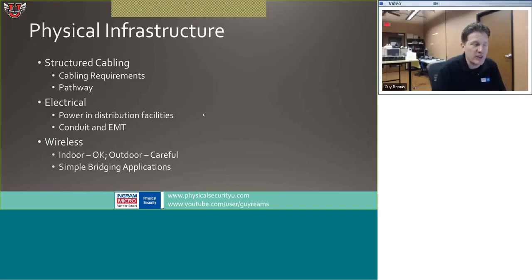I haven't mentioned it in here, but on the online course, I make a big deal about the percentage that physical infrastructure makes on a security job. When you go to do an IP security camera job, 40% of your project could be physical infrastructure. Just keep that in mind.